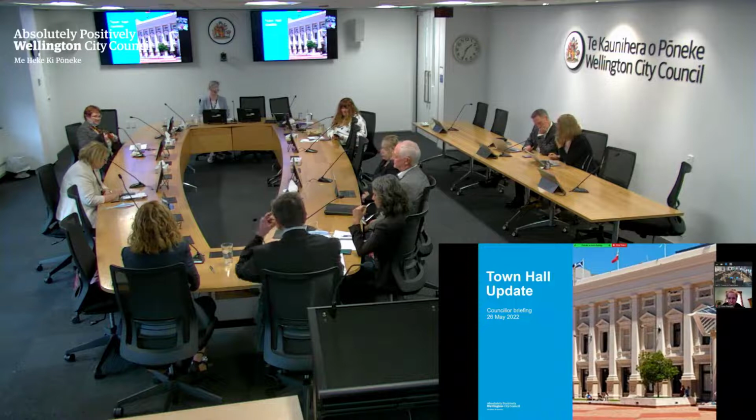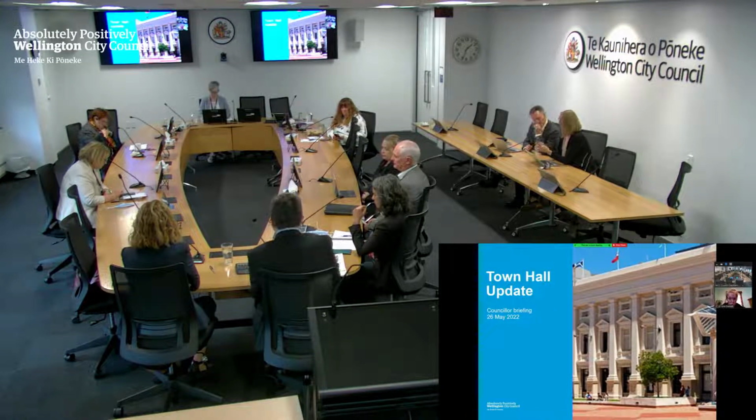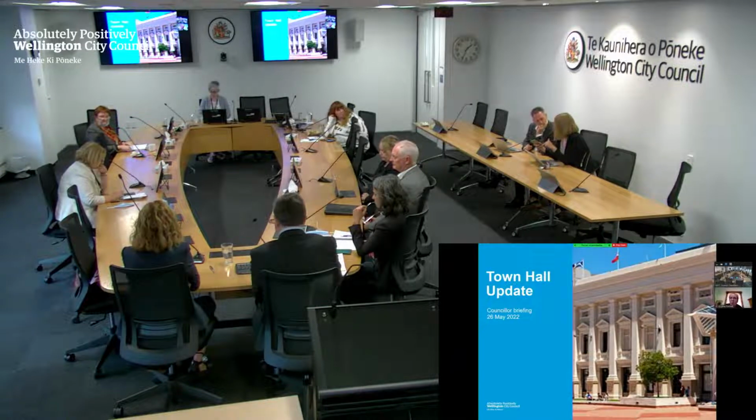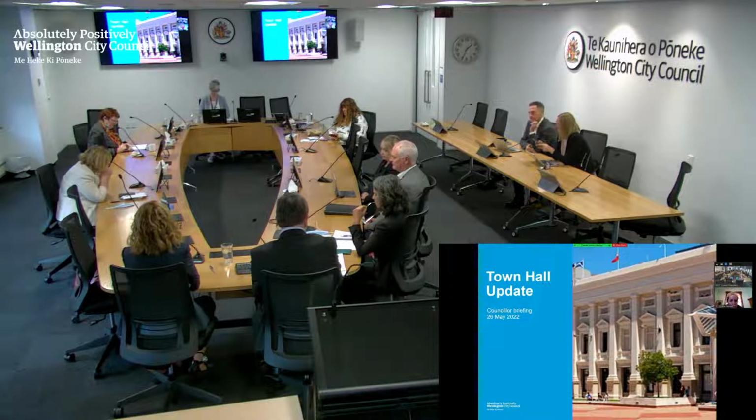was fully briefed on the risks associated with this project, given the age of the building and the land on which it's located. So the risks were very much to do with the unknown ground conditions, which could not be known until the work began, and also the full extent of the condition of the building itself.